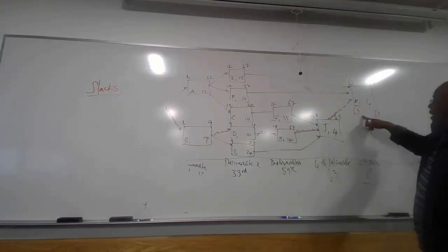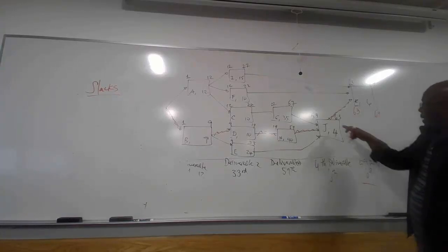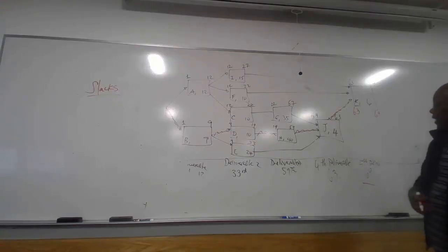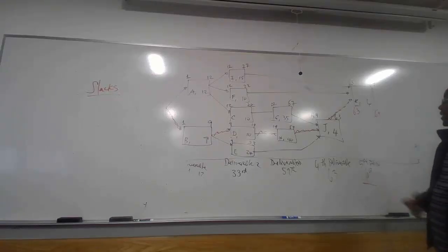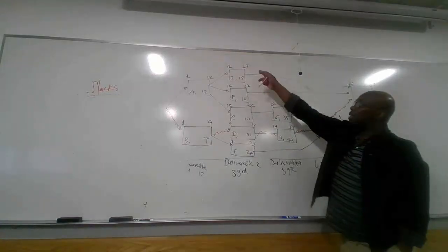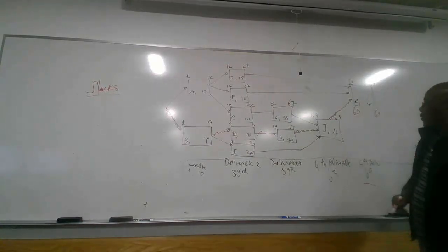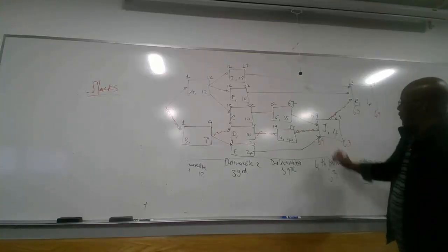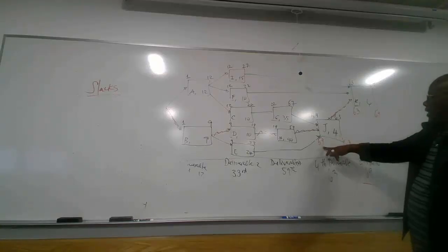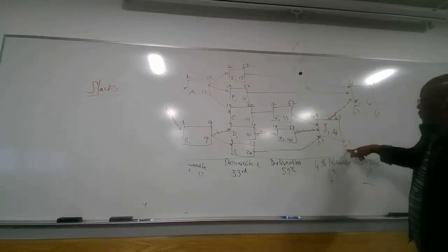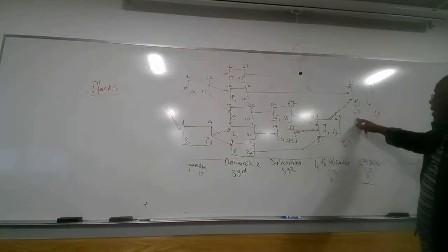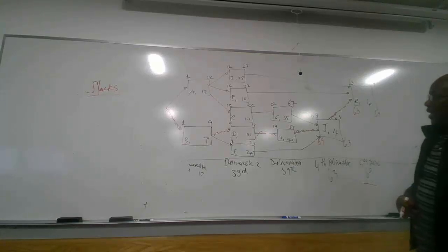So if that's the case, it has to depend on this activity to finish, which is the one that it takes more weeks. Here we have 22 and 27. So this one cannot be delayed, and therefore it has to start on the 59th. So we should start this on the 59th, finish it on the 63rd, so that we can start K on the 63rd and finish on the 69th.